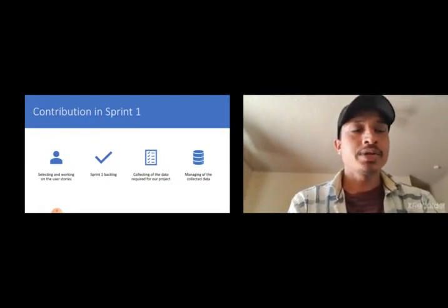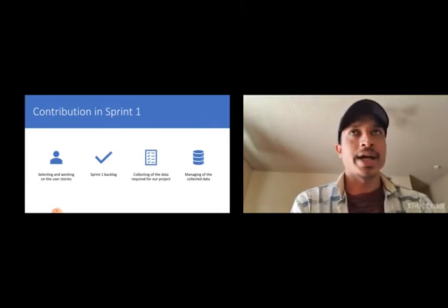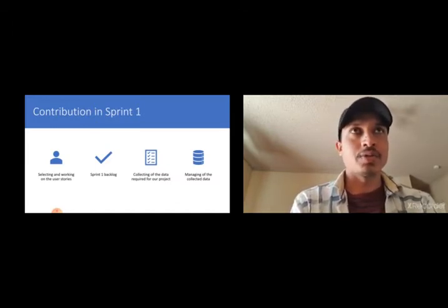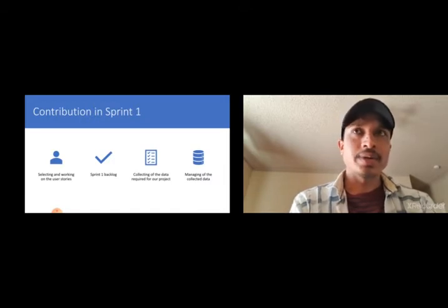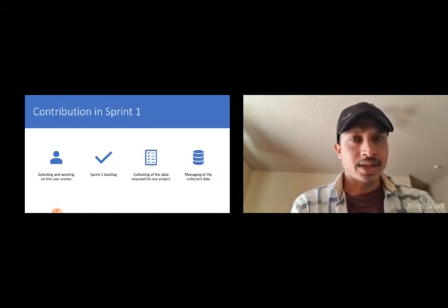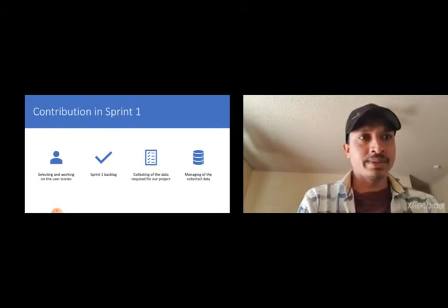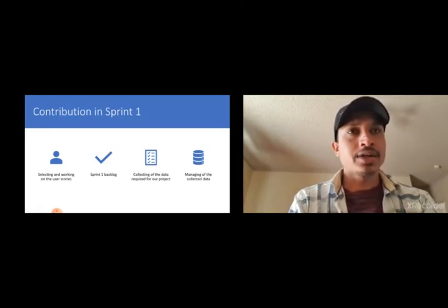In my contribution to sprint 1, I selected and worked on the user stories, and I also wrote the sprint 1 backlogs: what should be done, what the condition of satisfaction of the user stories is, and what the most important task in our hands is. The most important task in sprint 1 was the collection of the data. So I talked with the supervisor, the clients, and my team members, and worked on collecting the data that is required for our project.